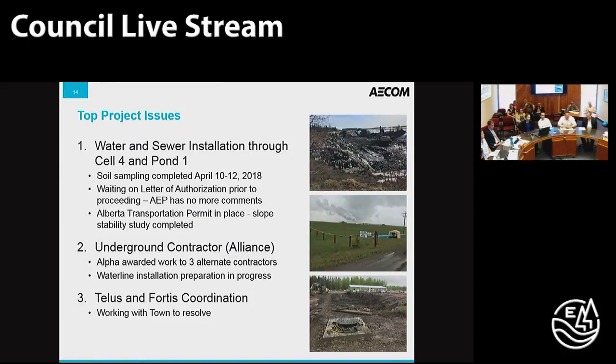They're using one specialized contractor for the interconnecting piping and the directional drill piping for the water main. So that's New Edge Construction. They're using a local contractor, Edson, to do the open cut water, sanitary, and the sewer tie-in. There's also a third smaller contractor, Lambo, that they're using for the electrical trenching. But in the end, the contractor was able to maintain their original price and the schedule.